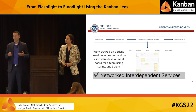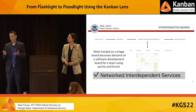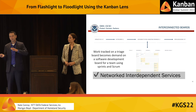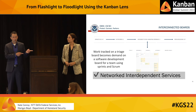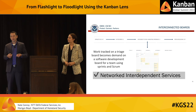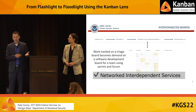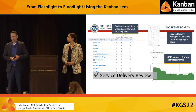You know, someone mentioned yesterday that work upstream doesn't always break down in the same way that work downstream does. And so here, once the card reaches the assigned to dev stage, it actually becomes demand. It becomes an item that goes on somebody else's board, which in this case, it was actually a team using Scrum. And so they will need to select that card during their sprint planning. And when they resolve it, then it moves to done on the original board. And so we recognize that as building out our network of interdependent services.